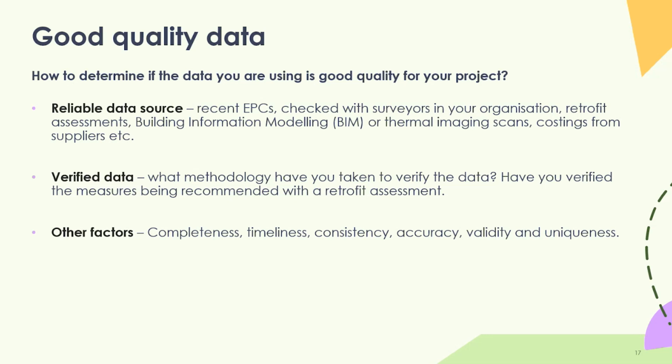Most private homes won't be re-roofing or changing windows anywhere near as frequently as social homes on their re-roofing or new doors and windows programs. So check in with surveyors in your organisation as well. If you've got any stock condition survey data, particularly if it's recent, that's normally a good source, because those will be undertaken by surveyors and will probably flag up things that an EPC definitely wouldn't. That's also very important, considering that you can't retrofit a home which is full of structural defects. Those things would normally need to be put right before insulating a wall or something.